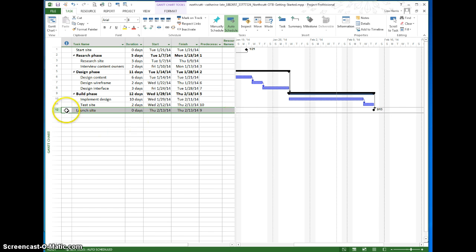This is really important because if you have those more rigid constraints you had before, the project can't expand and contract as it would normally. So in other words, if I change one of these durations to something like 10 days, it should move all the other days automatically. If I have those constraints in there, that may not happen if they're rigid constraints.